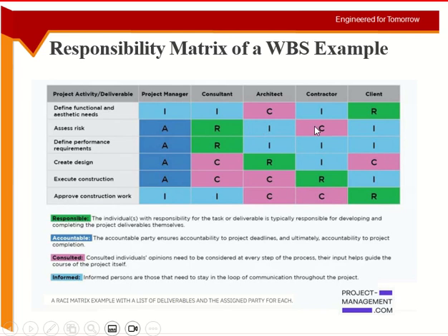So between the responsible and the consultant, they could be to and fro. They could be back and forth. You give me the information. Now you have a look at this. I prepared this. Is that fine? Give me more information. So it's not one time. R and C is not one time. You give me something now, and I will never come back to you. No. So before you go on to the approval stage, the person responsible should go back.